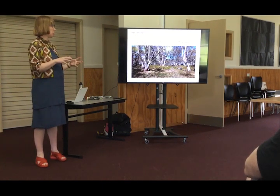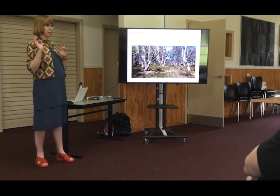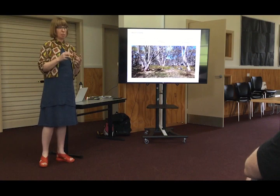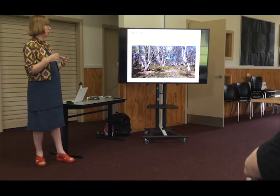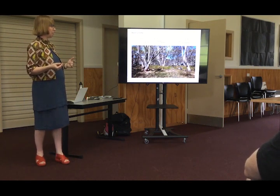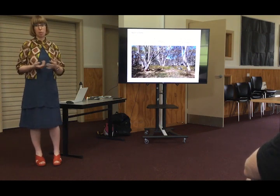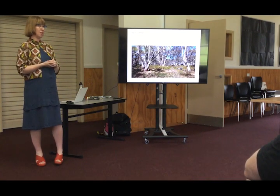That's great. So after this round of consultation, when we gather, we'll be consolidating all the feedback and talking with council and other stakeholders as well, talking with traffic engineering, quantity surveyor. They'll be putting together a design development package, so the designs will be worked up a bit further in more detail, taking all this information on. And then we'll have another round of consultation again, I think it's about mid to late February or so is where we're aiming for at the moment. So that'll be more detailed plans for everyone to comment on again to make sure we're on the right track. And cost estimates. Yeah. So people know how much things are going to cost.